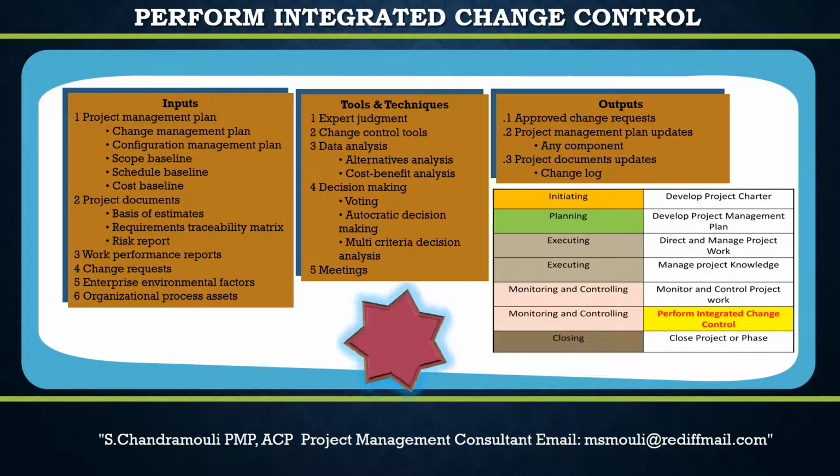The next tool and technique of Perform Integrated Change Control Process is meetings. In this case, these meetings are usually referred to as change control meetings. When needed for the project, a Change Control Board, CCB, is responsible for meeting and reviewing the change requests, and approving, rejecting, or other disposition of those changes.